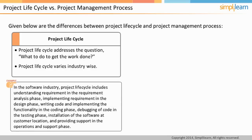First, you understand what is required and analyze it as part of the requirement analysis phase. Then, as part of the design phase, you figure out the implementation and arrive at the approach. Next, you implement the functionality by writing code as part of the coding phase. The code is then verified to ensure it works right as part of the testing phase. The tested and verified software is then installed at the customer locations as part of the installation phase. After the installation, the system then moves into the operations and support phase.